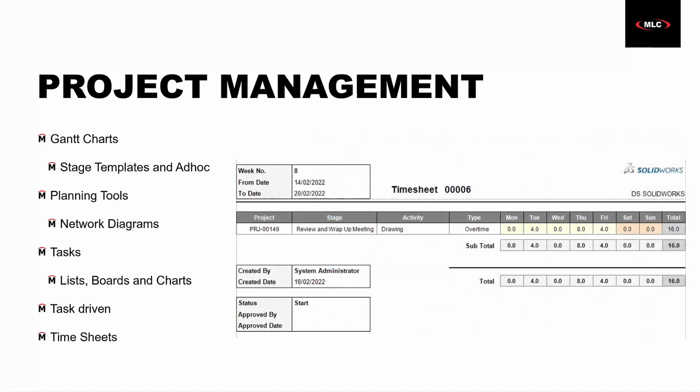And tasks go even one step further with timesheets. Depending on your contributions to a project, at the end of the week, if you need to run your timesheets, it will automatically understand which projects you've been contributing to and include the time based on your task completion to your timesheets. And these timesheets even have their own process that go to your own manager. And so they follow a set release process and approval process.